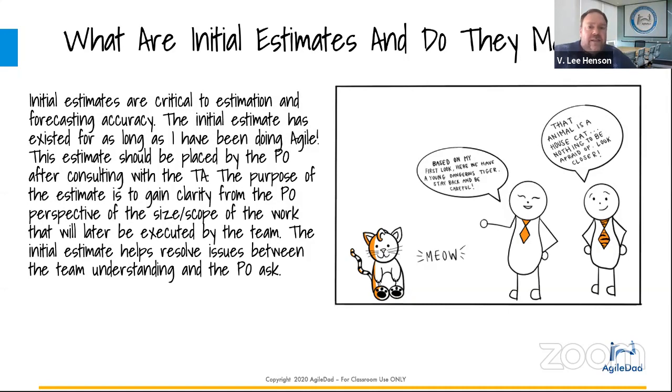So let's see. Okay, so going back to the 2-week sprint, how many points are we going to fit? Good question. If we're talking about 2-week sprints, it's not going to be an initial, hey, we're going to start with this. Let's just pretend for a second the team has never worked together before. Oftentimes I'll tell everyone in positions of authority that I'm going to start the team with just 10 units, 10 points. And everybody says, well, that's low. And I'm like, exactly, because I want them to finish those and then come to me and say, hey, we finished. What do you want us to work on next?